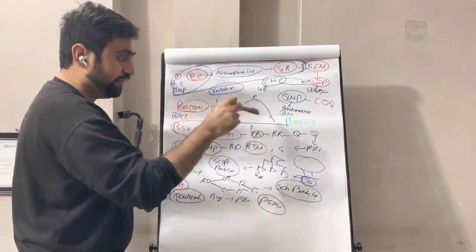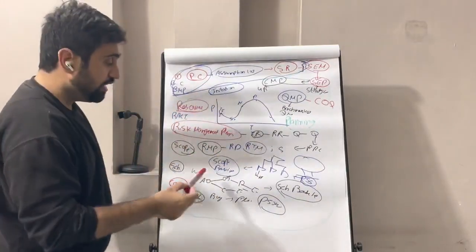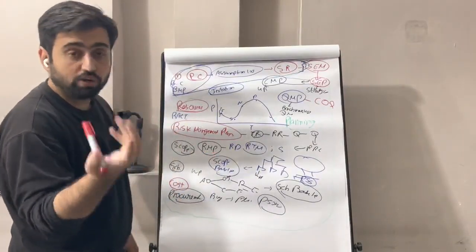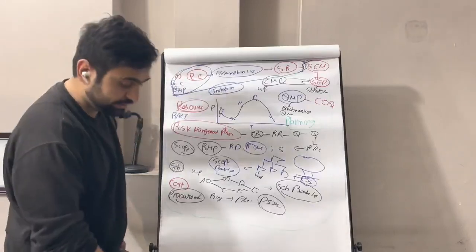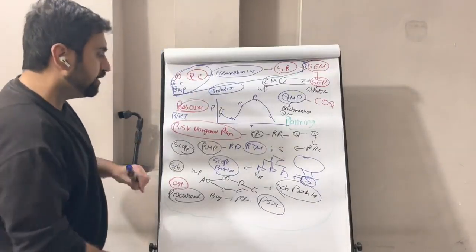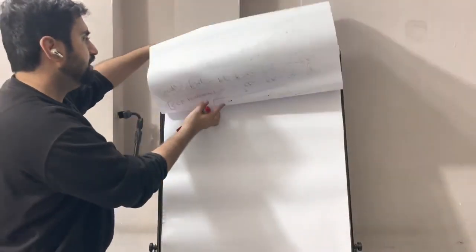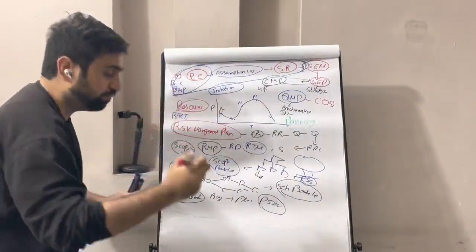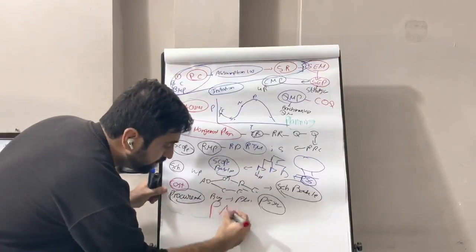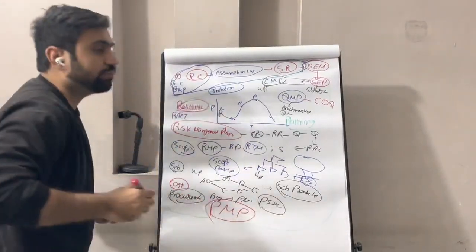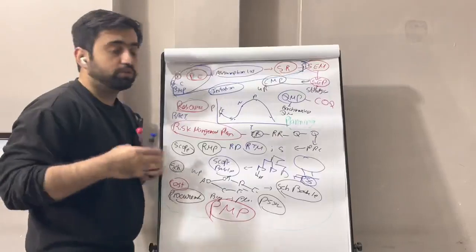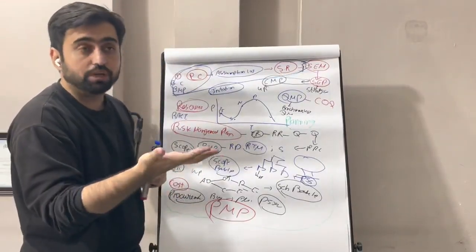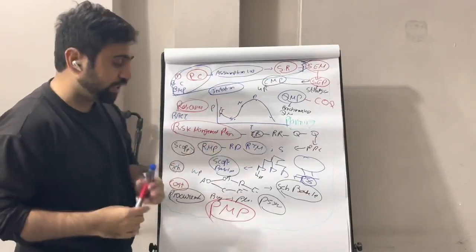you make the risk plan. But procurement is always done after we have a scope plan at hand, because from there we understand what things we need to do, what we can do inside and what we can do outside. Once this is done, all these plans go into one comprehensive plan called the project management plan. Once the project management plan is made, we give it to the sponsor, the steering committee, the stakeholders. If they approve it, now we are ready to go.